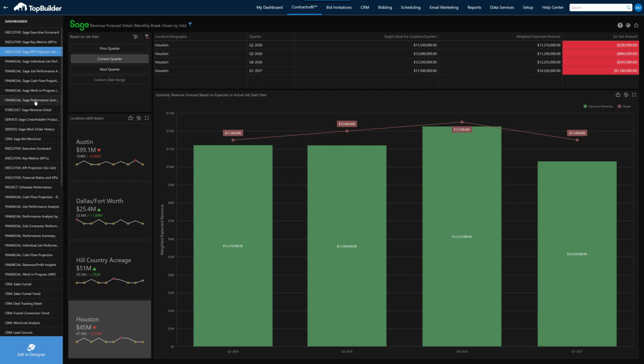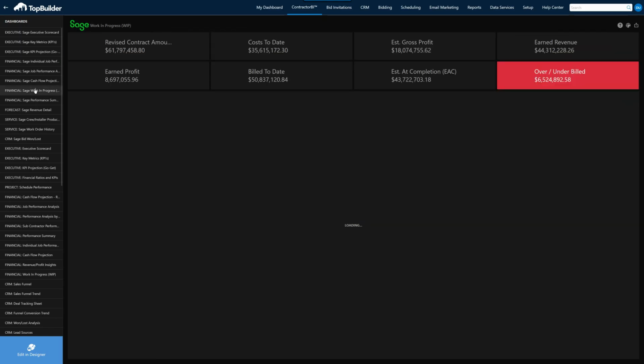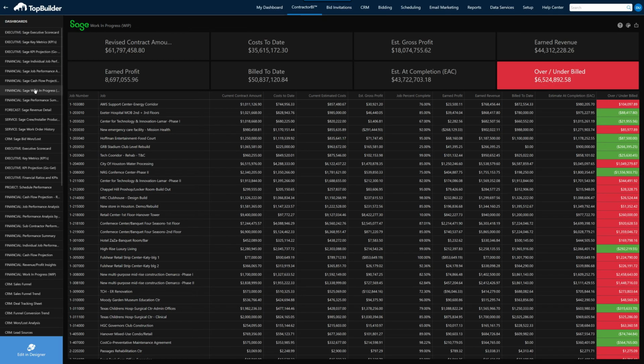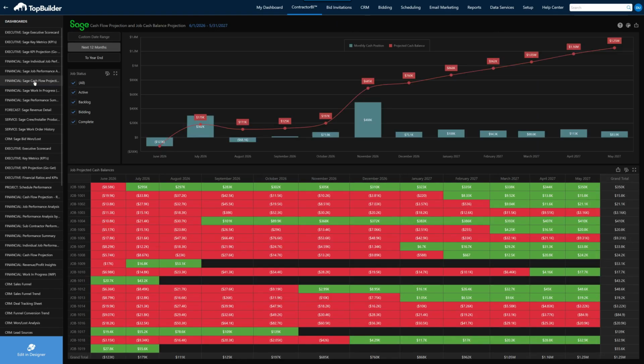Some discussions came up about it in CFMA's community cafe. And I said, look, cash flow is great, but you need to make sure you pay attention to 2 things. What is in your bidding pipeline needs to be reflected in your cash flow analysis, so you can project how much money you need to do those jobs that are in the bidding pipeline, and when they become cash flow positive, so you can potentially go to the bank and get that money.